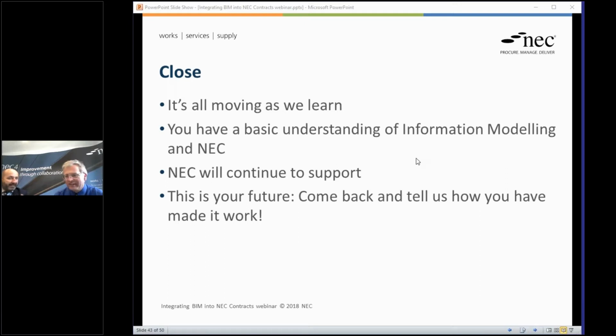Start again. Sorry. The general starting point is that the data will go to the employer. The data provided will be owned by the employer because they're going to need that to run their model. They have to have ownership of that data, that IPR, in that sense. But it's only to use in relation to the model, and the idea is they would not then share it with others.